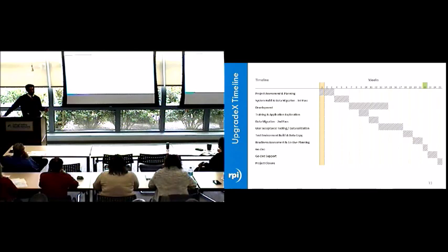At the conclusion of the second pass, we're going to turn the system over again, and that's when you would be engaged in your user acceptance testing, more rigorous data validation, maybe some side-by-side payroll reports, things like that, to really get a comfort level. If it is a three-pass approach, we refer to that second pass as kind of the go-live dress rehearsal or a mock go-live, as I saw in Jeff's slides.